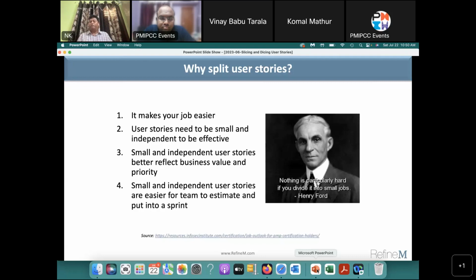So that's the size of the story that you want to have in the sprint. That is how much you need to break so that you can finish it within the sprint. So many times the teams do like one story point is equal to 1 day of work, and there's nothing wrong in that. Many real agile people will say, don't equate with effort. It's a combination of effort, risk, and so on. But for the teams that have been using effort to estimate for the last 20 years, how can they change quickly overnight? Not possible.